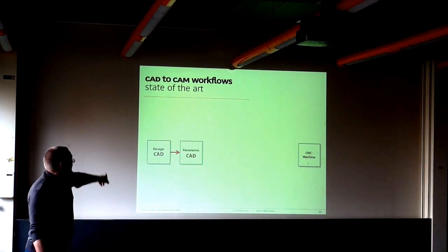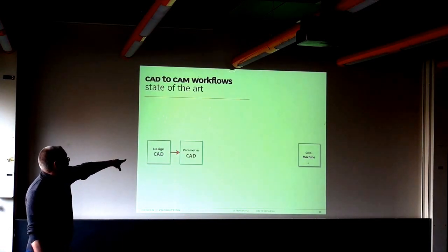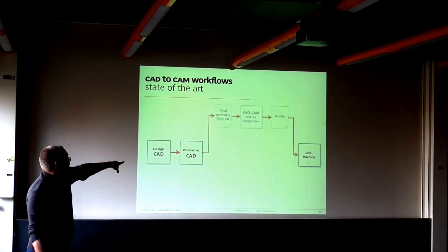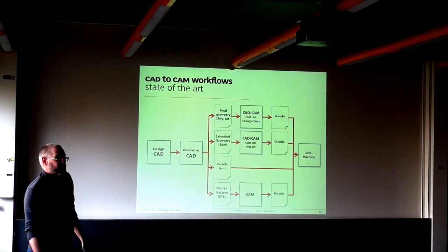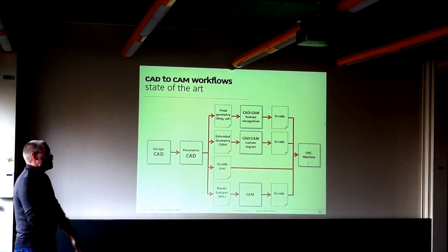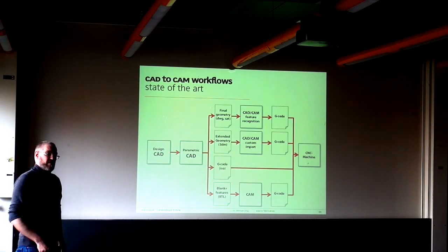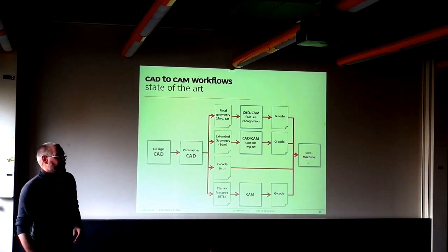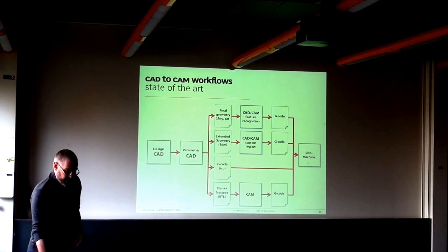Which means your nice little linear digital chain from the beginning then looks like that suddenly. You have 4 different fabricators, probably even someone who's producing the raw material. They all need different information. And you have to talk to them to actually provide them the right things at the right time in there.